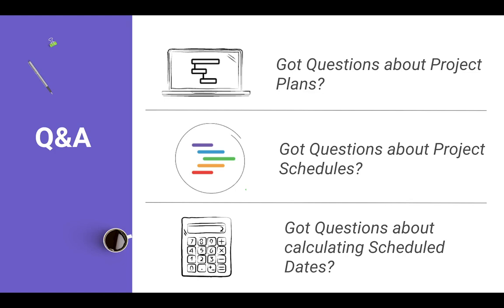And so we want to give them the power to do that. The only caveat is that as soon as the task is progressed into a started status and then into a completed status, we're going to set those actual dates as the dates that the work actually started and completed.